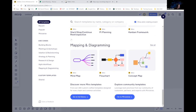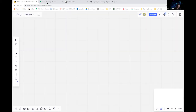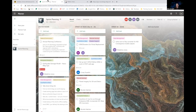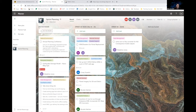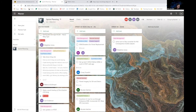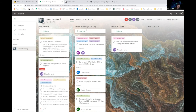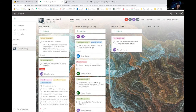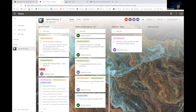Google Jamboard is very similar to Miro. If you want to check out another tool and you have G Suite as an option, Google Jamboard would be one to look at. Moving on to our sprint planning process — here's our backlog, or 'on the radar' list. This just contains tasks that are coming up, and for each sprint at the very beginning, our team will bring over cards or create new cards for tasks that need to be completed during the sprint.